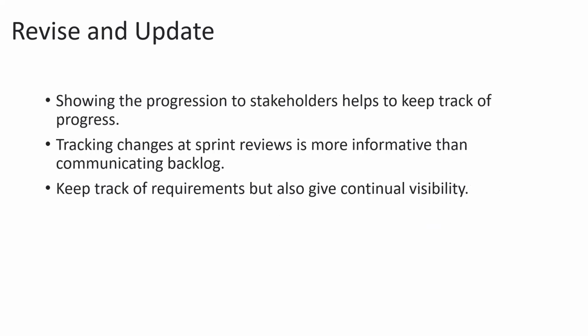So that will keep on happening even after the working epic user story mapping is ready and you have started everything on the project. You may not need to come back to the initial or working mapping that we created in an agile board or using some application. You can again track it via the epics and user stories that have been created in Jira. Any change, we create it and then accordingly include it as a product backlog item in the backlog. Then the prioritization, estimation, and all these activities will be done.